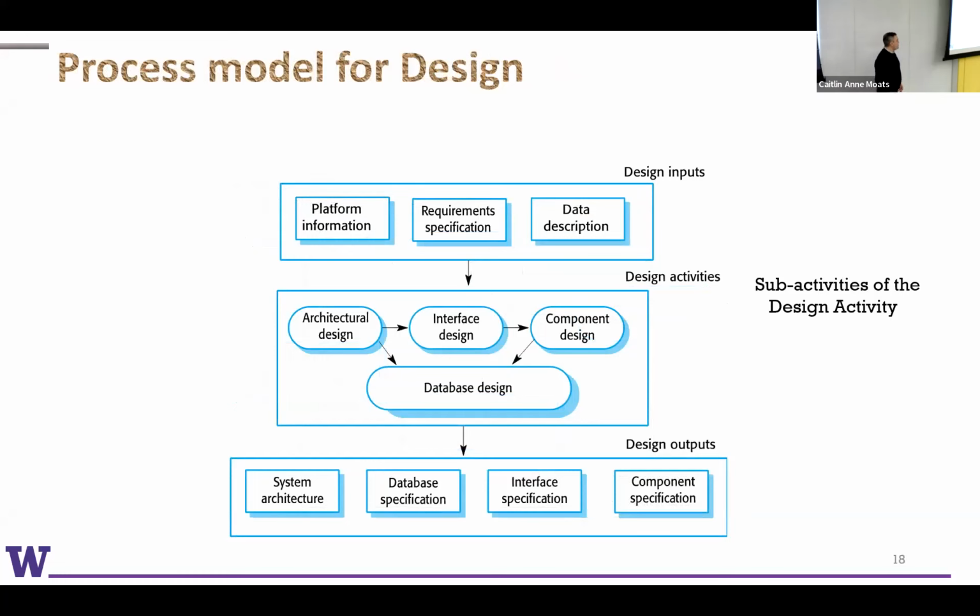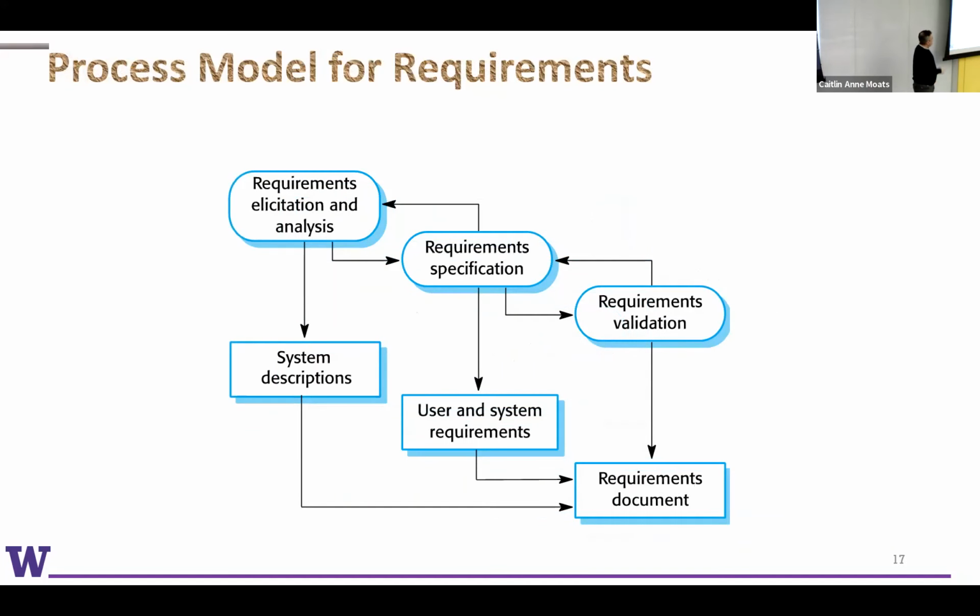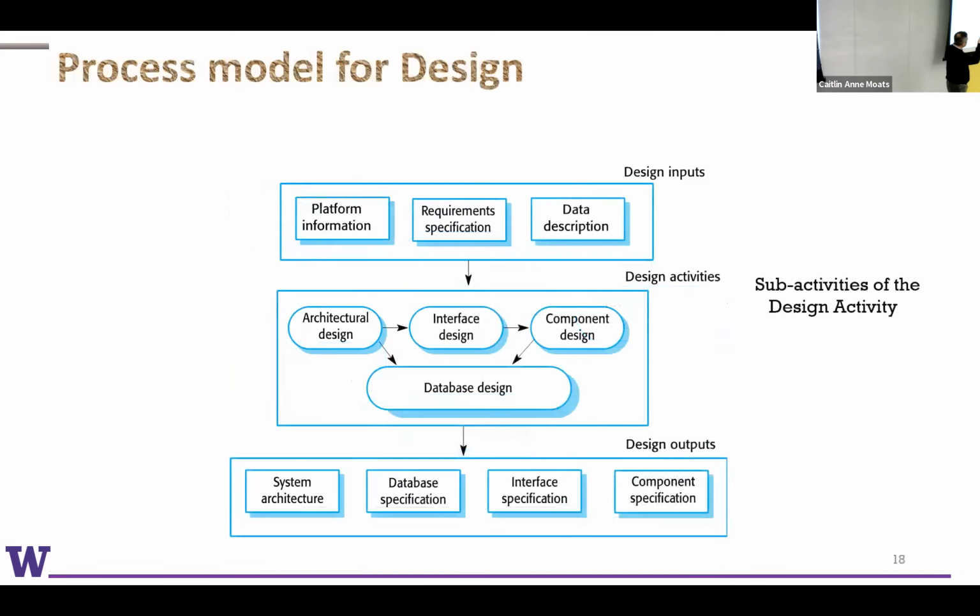Similarly, the design process, we are going to take them and put them into our plan. Usually the top level of our plan is just these activities. I just say, if I'm going to develop the software, I start with this requirement elicitation activity. How much time do I have to spend? Let's say 10 minutes, sorry, 10 weeks. And then next step, specify the requirements 2 to 3 weeks. Validate the requirements maybe a few days. And then you go to the design. You go to the other steps, step by step. So it is at the same time your planning process. They guide you in your plan.